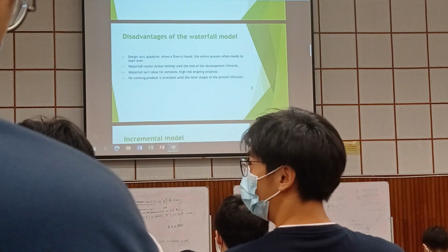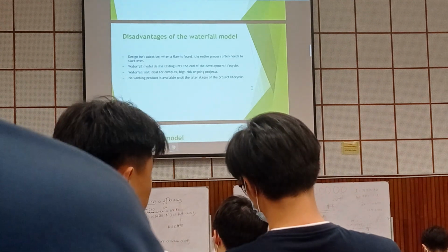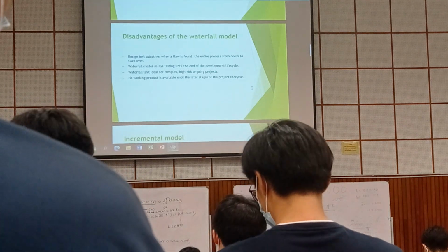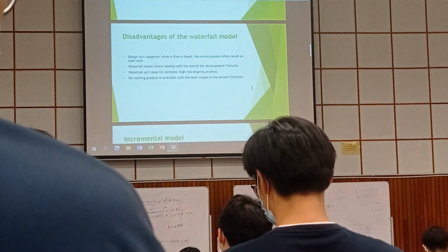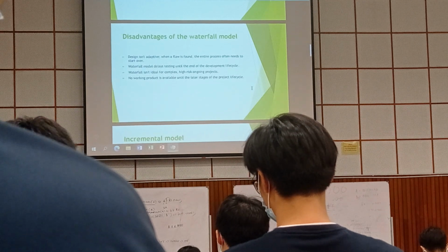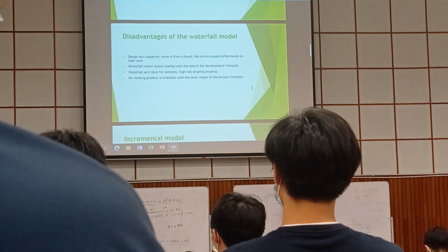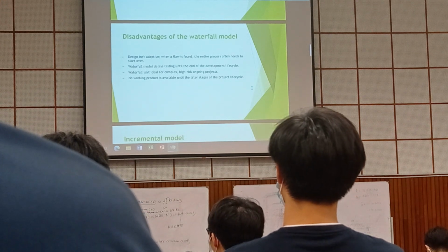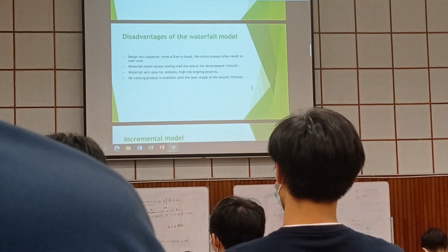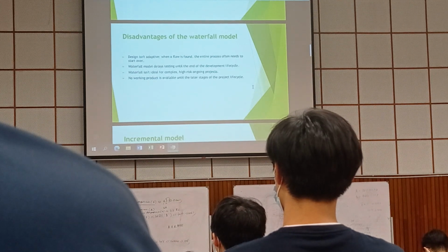Let's say you develop one module, maybe the user interface is ready. You want to do testing, but you cannot. You have to wait until the user interface design and all the other modules are finished, then you do testing. You cannot say, once I develop one module, I test it, and after that test the next. No. So that is the disadvantage.